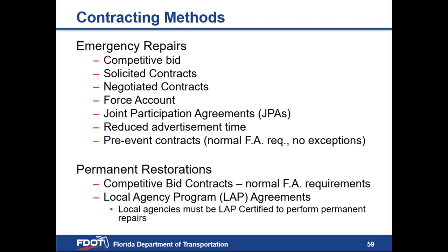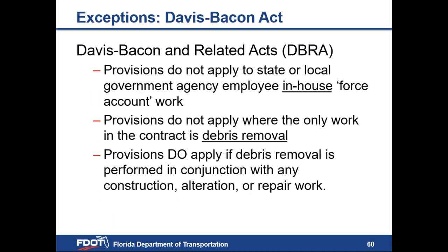Solicitations for permanent repair projects are handled in the exact same manner as a standard LAP project using standard competitive bidding. A local agency must be LAP certified to administer permanent repairs. Davis-Bacon wage provisions for emergency relief contracts do not apply when local agency staff are performing the work — force account work — or when the contract is solely for debris removal. However, Davis-Bacon wage rates must be included in the contract if debris removal is being combined with any other construction, alteration, or repair work.